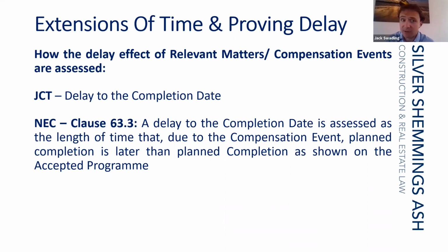Effectively the same thing. We're only really looking at delay to the completion date, and that is why having a program at the outset which shows the logic of the work, and then updating that program as the works progress, showing how it has been actually built relative to how it was originally planned and what events have caused delay during the course of the works, is important.